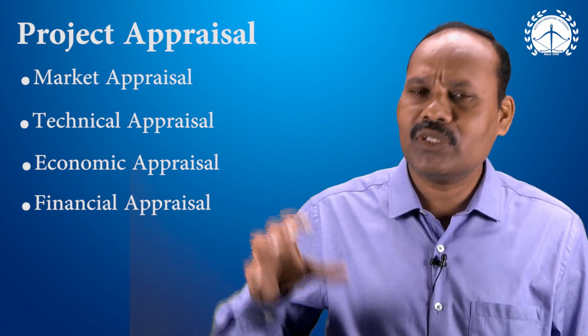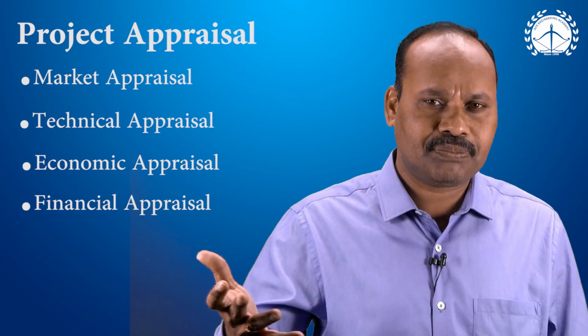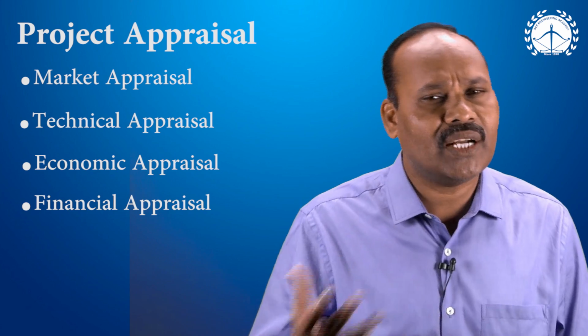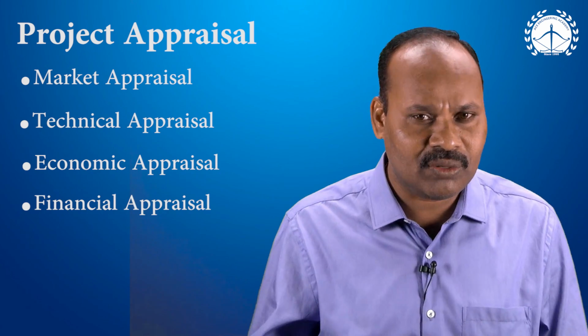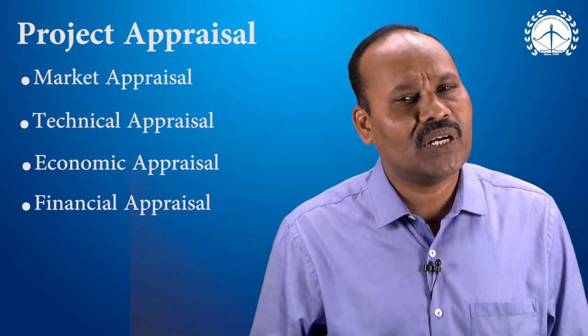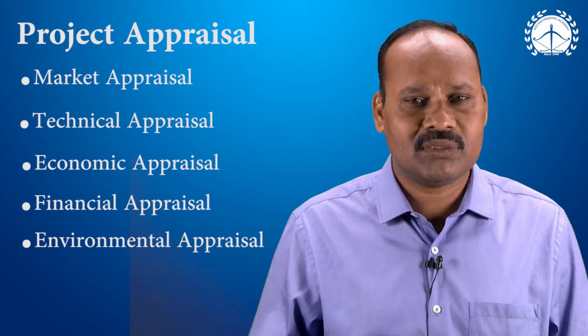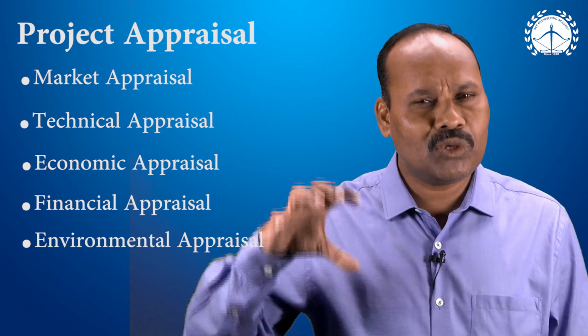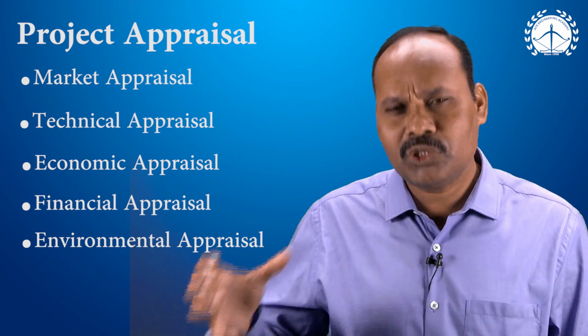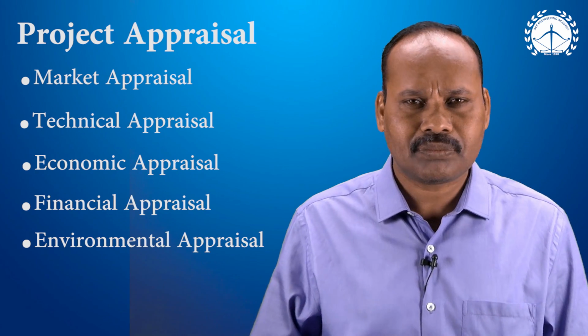If the present worth is positive, then we can proceed. If the present worth is negative, then we can understand it is not at all economically viable. And very important, environmental appraisal. Today we need to take care whether our project is going to damage the environment. This issue is now becoming critical.